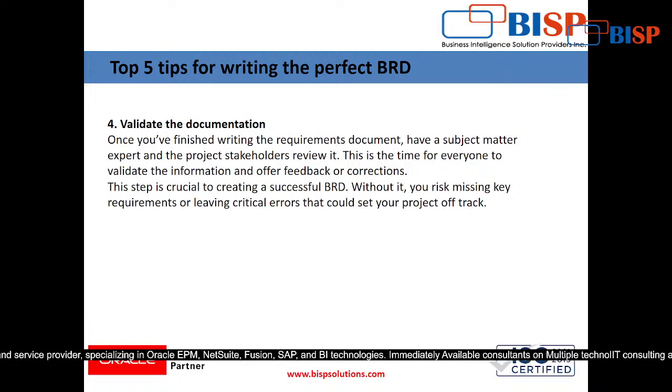Why? Because once you have done your scripting part, once you have prepared your interfaces and the client says that no, this thing is missing, you and your developer both have to work double. So that's why take time in preparing a BRD first. Don't be in a hurry, just take your time to prepare an effective BRD and then you have to go further.